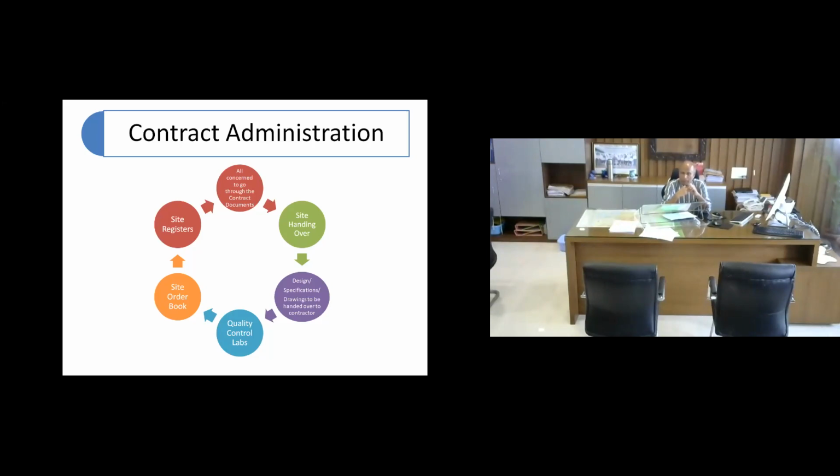The project was in Maharashtra. As you know, Maharashtra has a very acute shortage of water, particularly during summer season. It was the month of May. I went to site and found that earthwork had commenced, but adequate water arrangements were not there for addition to those soils and compacting it. I asked my DPC and agency both why they were not following the specification. They said, sir, it is Maharashtra, and it's not possible, there is no rain water and all. We will not be able to get water from anywhere.